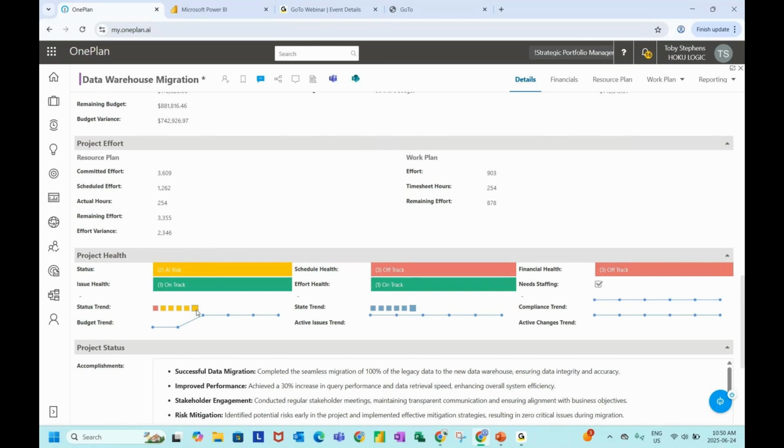So your status report could have a cadence of weekly, monthly, or bi-weekly, etc. It all depends on your status report. So that's when these status report trends are taken. If I put my mouse cursor on one of these lines here, it tells me that on June 5th, I had 1.053, and then you can see the previous status report, I had 903,266. So you can see that my budget is going up along the way. And you can do the same thing for your forecast or your actuals and display all of that on your details page.